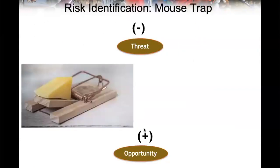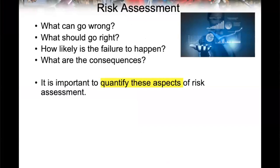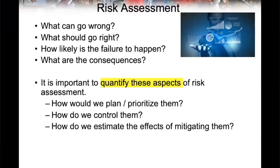After risk identification, you come up with five risks — cheese not being real cheese, maybe a rock, maybe a stone, maybe poisoned injected cheese, or the lady waiting. So what do we do? We try to assess them. Which one is more likely? Which one is more impactful? That plays into the second step: risk assessment. We want to quantify the risks so we can prioritize them and then develop strategies, all within our budget, timeline, and resources.